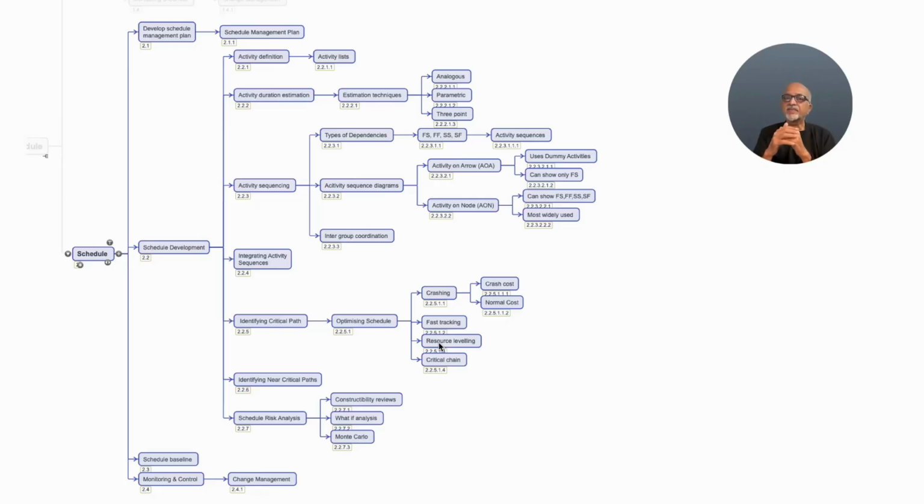But if I do steam curing, I can reduce the lag, but the cost can be more. So we may have to optimize the lags in order to achieve the desired end dates. And another opportunity is leads. Lead means parallelism. That means when I complete design 80%, I can start construction. So there is a 20% lead. A lead always compresses the schedule.